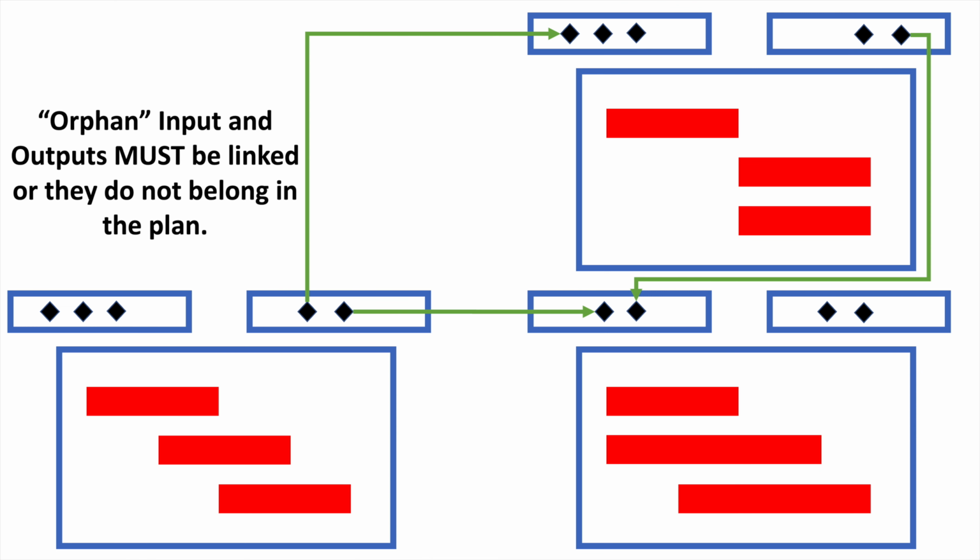So in the case of an input or a receiver to that engineer's work, a giver from the supplying function linked to a receiver milestone for my engineer, and then the receiver milestone is linked into that engineer's detailed plan. And when that same engineer produces a work product to be given to another function, I link that activity to a giver milestone in the giver-receiver section, and then that giver links to a receiver milestone in another area of the plan. One person's giver is another person's receiver.